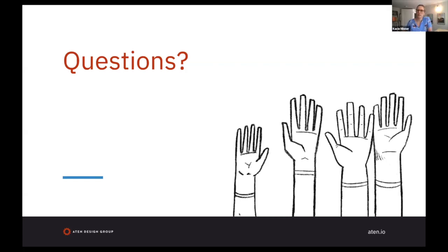Yeah, the only other thing I was going to add, I was going to touch on the meetings like Sally did as well. And maybe it's a good idea on your project plan that you likely have as a visual for the whole team to add a column of who the attendees should be for each review phase or feedback needed kind of thing, so that they're following along there as well.